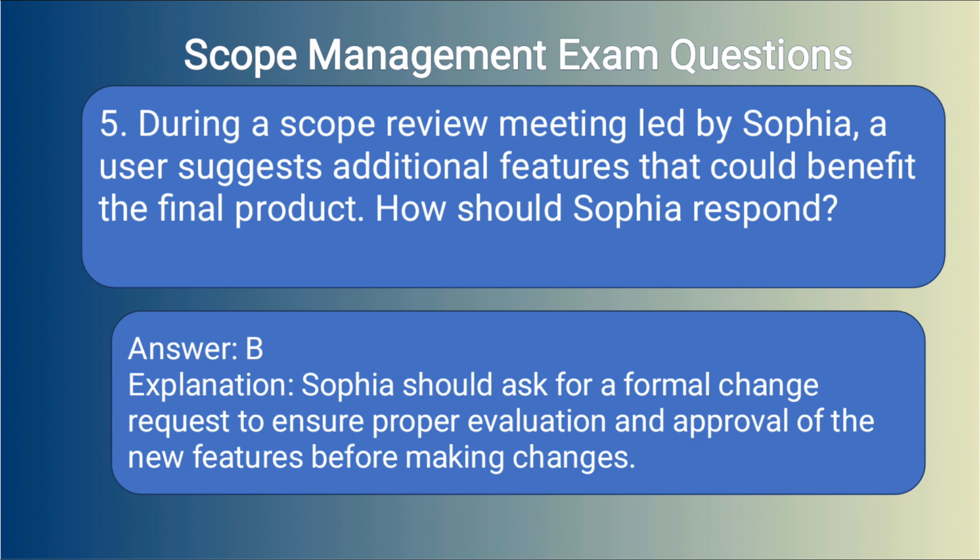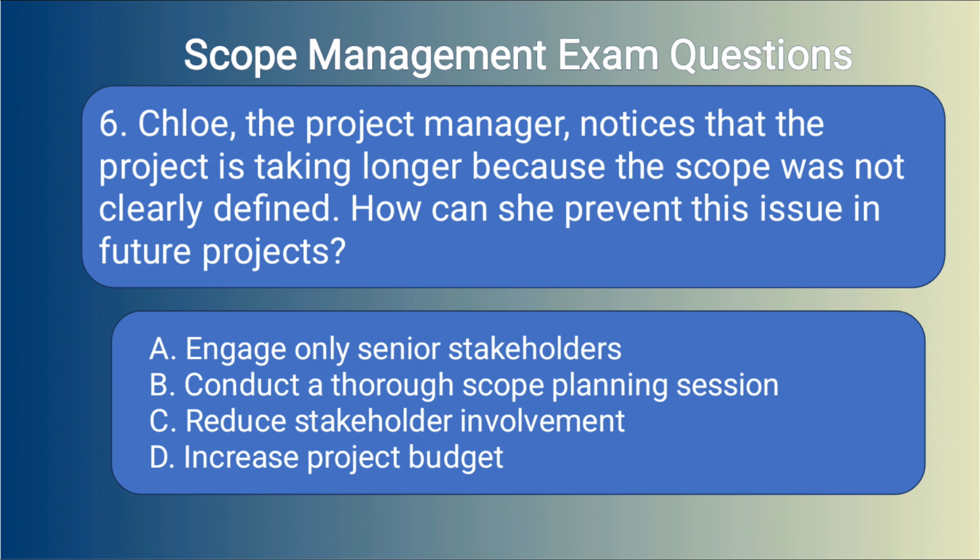Answer B. Explanation. Sophia should ask for a formal change request to ensure proper evaluation and approval of the new features before making changes.